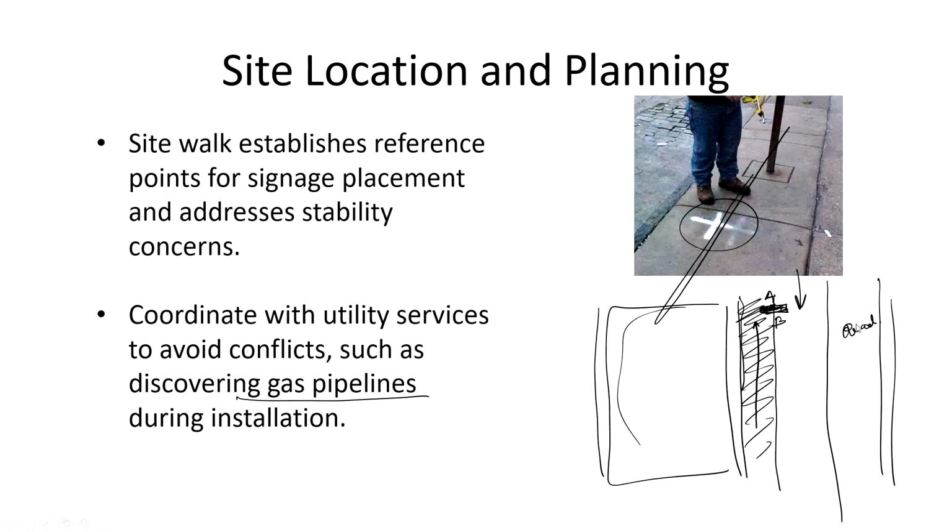In case the drawings maker is not in the team, in that case the drawings related to that field have to be with you, so that you can easily trace where the best locations are where we can place the signs, because signage is the last part which actually comes into the picture after installing the landscape, the water supply, the electricity, even your optical cables, everything.